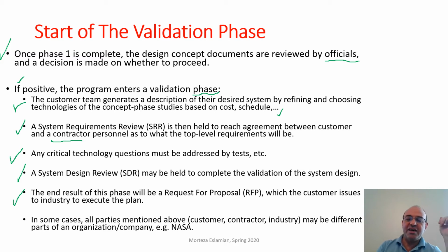So far it's been like a feasibility study, but then documents have to be prepared, and that document is called a request for proposal, if the project is going to be done externally, right? If it's going to be done internally, then this stage may be different. If it's been defined by NASA and then it's going to be done by another section of NASA, then it is kind of internal, so the process will be easier because it will flow internally.